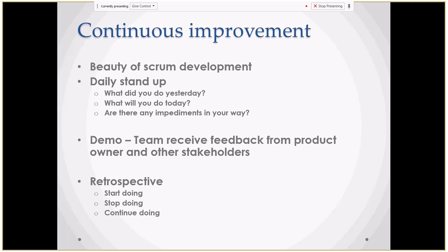During the demo, we present whatever we develop, whatever we agreed, the developed stories or the requirements, with the product owner. So we can have product feedback from the product owner itself, the client. So they will give us any improvements. They might give improvements, or they will say this is not what I exactly expected. So in that case, discuss them maybe during the demo or right after the demo. Add them into the backlog itself. Ask the product owner to add them to the product backlog itself. So you don't miss.